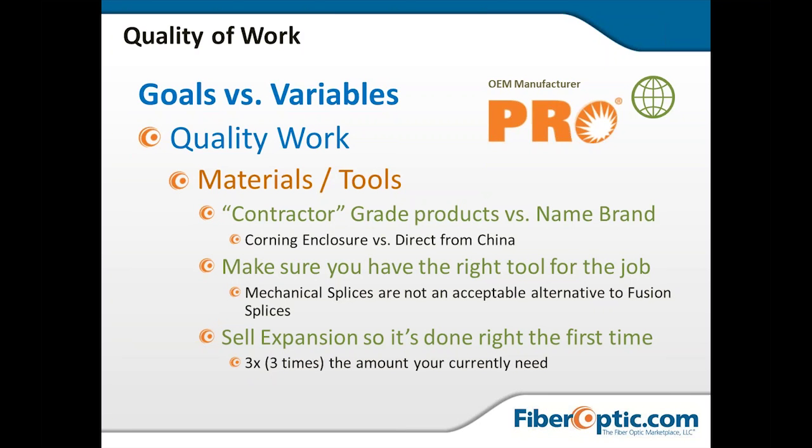We've worked with a local municipality here in Pennsylvania called Lansdale Borough, and there was a bid that came out, and the contractor who won the bid was actually out of Canada, but was buying Chinese fiber directly from China and dropping it into the states at a much, much lower price than anybody else could afford to do.